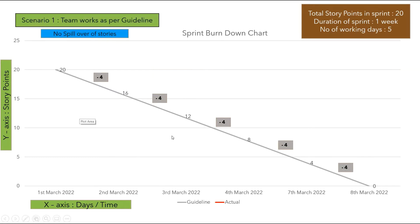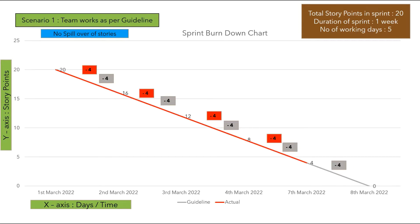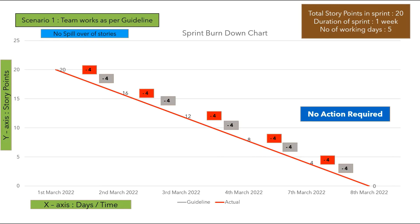In Scenario 1, the team works exactly as per the guideline. Every day, the team burns down exactly 4 story points so that remaining story points reach zero by the end of the sprint. The actual line completely covers the guideline. All user stories are successfully completed, so no action is required in this scenario.